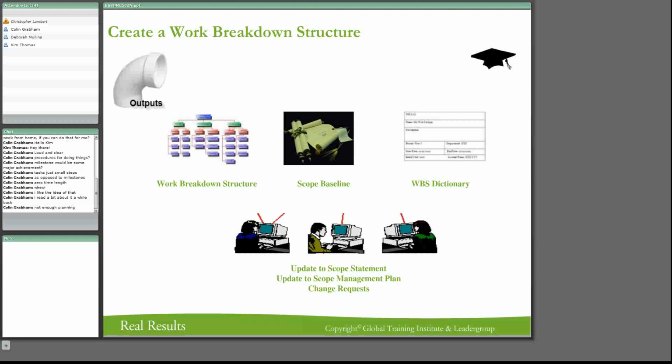It's a good one. Probably not enough planning, but it has a problem and the risk of scope creep. All right. Remember, you can actually now expand your activities, and suddenly you've got too much here. So it's not so much planning as it is scope creep. In other words, you can start putting things in there that the stakeholders start having an influence on, and they want this a little bit more. And quite right, the other one is obviously one of the risks would be that you might not have planned for some eventualities as well. So there are some issues with that one.